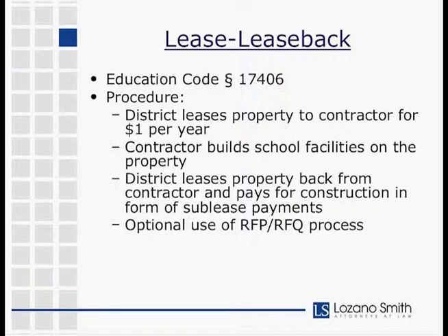In some ways, the lease-leaseback process might work a lot like the traditional design-bid-build method, except that you don't necessarily go out to bid for your contractor. But essentially, you would start by engaging an architect to draw up plans. Those plans would be approved, and then the contractor would be selected and would build the project based on the approved plans. As I said, with lease-leaseback, you're not required to competitively bid the project.